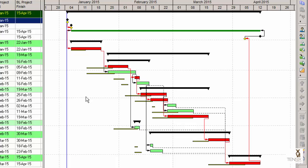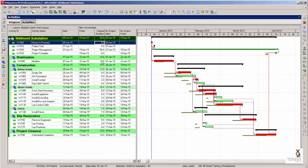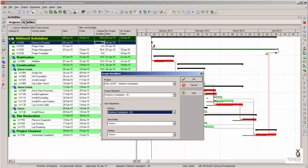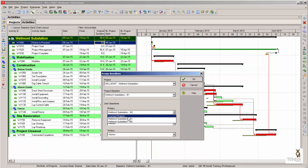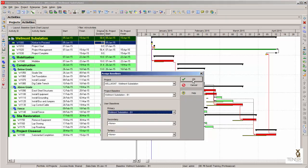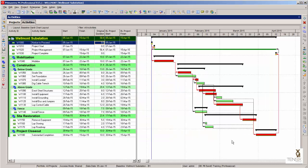Making changes to the baseline would ordinarily be done through some kind of formal change control process. Let's go back to our original baseline. I'm now displaying Wellmont B1, the original baseline, which had the original dates, and we get back to our normal state. What I'm going to show you next is when this project starts to be statused, how we start to see variance in the project.